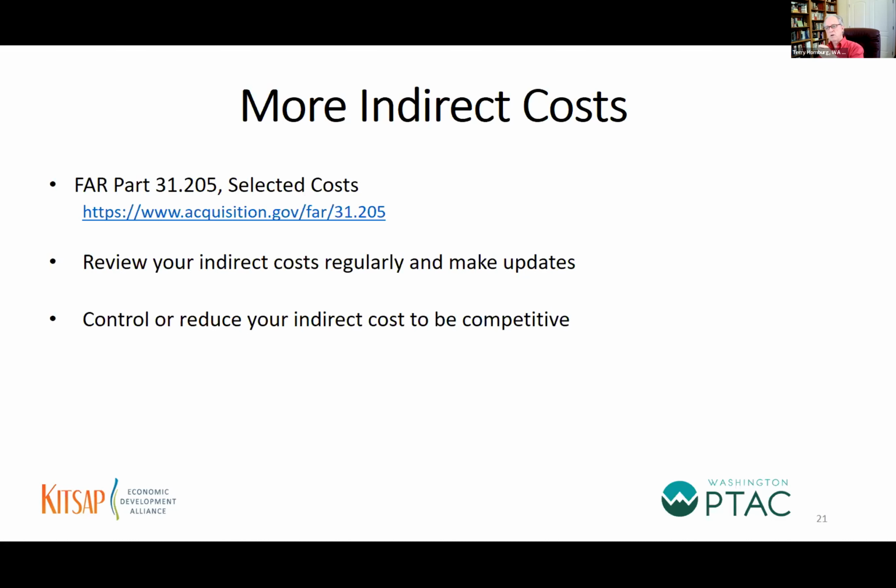So anytime, and this frequently happens, just me personally, I may switch insurance companies to get a better rate. Anytime any of those items in your list of indirect costs changes because you've gone out and got a better deal from somebody, and you've got this new rate now, you want to go into your computation sheet here and change that, and that's going to affect your bottom line hourly rate or monthly rate or the annual rate.